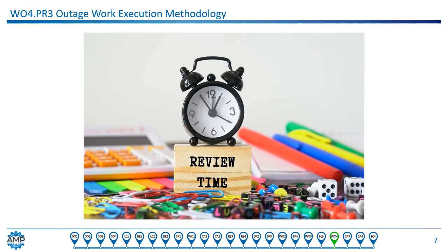Outage work execution is pretty much the same as routine work execution, except there are usually more resources concentrated in the work area. Care must be taken to ensure workers don't try to occupy the same space and time and interfere with each other's efficiency. There's also often a sense of urgency or schedule pressure that requires management to ensure work isn't done in a hurry, thereby increasing the likelihood of infant mortality and failure during startup.